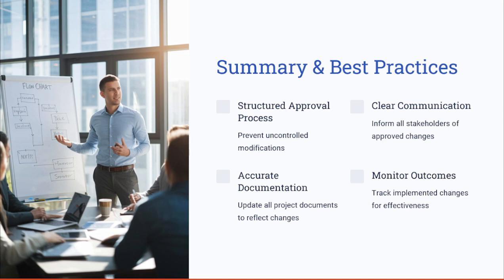Follow best practices such as conducting thorough impact analysis before approving a change, ensuring stakeholders are well informed about the approved modifications, updating all project documentation to reflect these changes, and tracking the outcomes of the implemented changes to validate their effectiveness. The project then remains aligned with objectives, budget, and schedules. Effective change management leads to improved project success rates and stakeholder satisfaction.